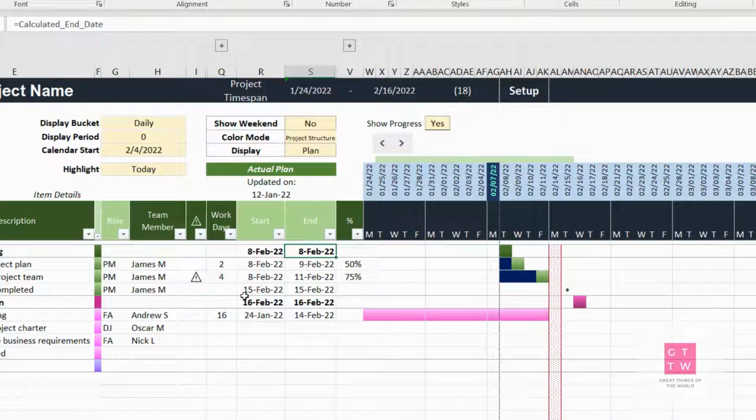If I take the same date as the max date, then it should cover the whole project duration for that particular stage. So in this case you can either mention it manually, or there is a formula I can give you, or I can provide under the setup screen which formula to use. Your stage percentage completion will be calculated based on the completion of your individual tasks, and it will be displayed accordingly.